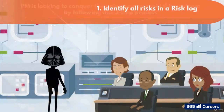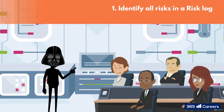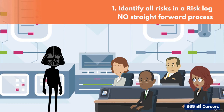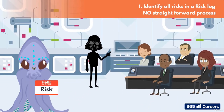The first step is to identify the risks. Throughout the planning phase, the project manager will list all the risks they encounter in a risk log. They must continually add to this through all stakeholder meetings and workshops. Of course, it's not a straightforward process — the information is not just sitting there with a badge saying 'risks.' They must use their skills, knowledge, intuition and team to uncover them.